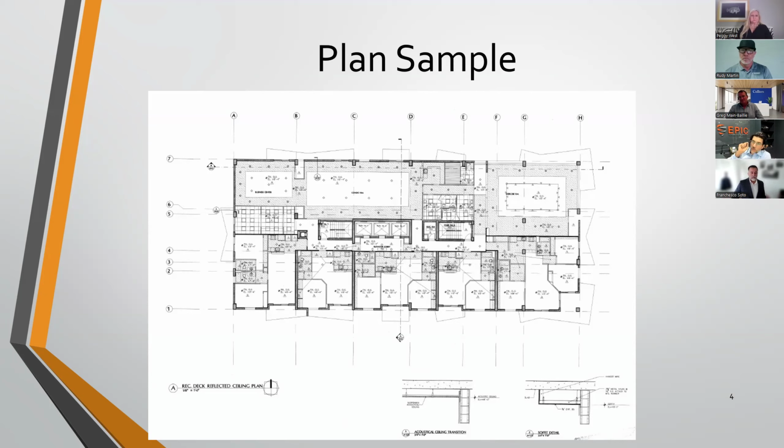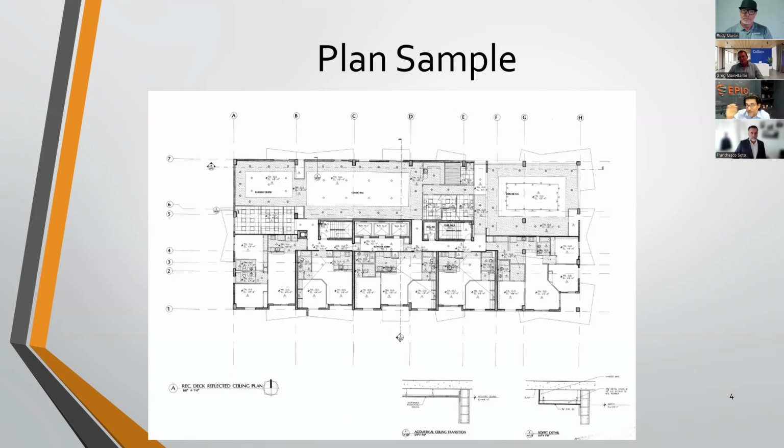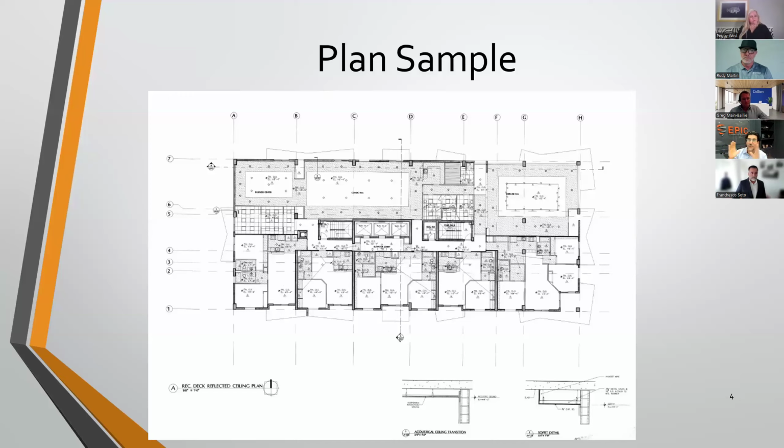Okay, all right, well, here's a general conditions clause. Here's the mobilization cost. Here's the stucco item. Here's the concrete item. Here's the post-tensioning item. Here's the waterproofing item, so on and so forth. But it is laid out to a point that you remove levels of subjectivity, so that you can accurately have apples to apples instead of apples, oranges, pears, and watermelons. So that is step one.